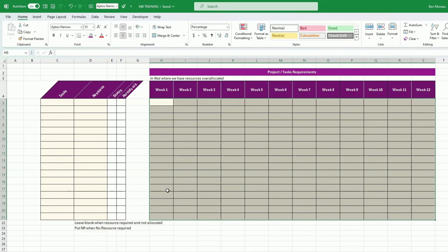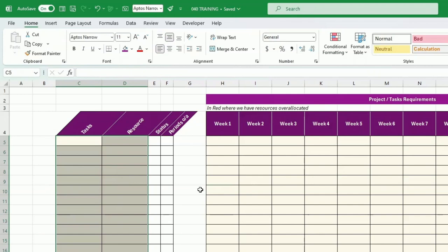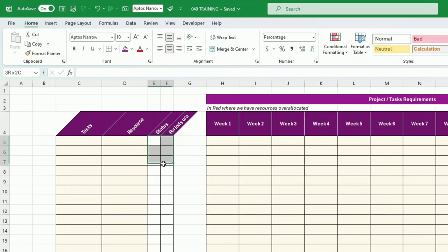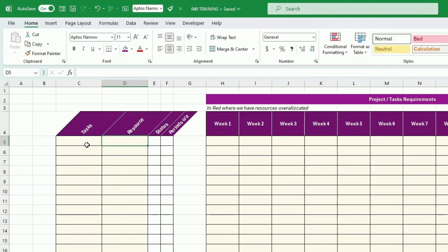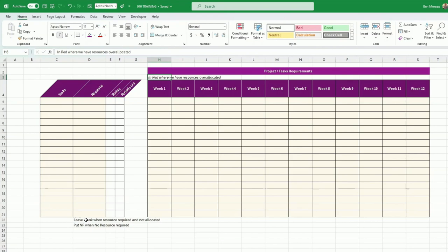You can have as many rows as you like. On the left-hand side I have four columns. The ones in pale yellow are where you input things, and the ones in white are calculated. The first column is for tasks, the second for allocating resources, the third for status, and the fourth for the number of periods of over-allocation. When the resource is required but not allocated, leave it blank. When no resource is required, put 'NR' — this way you won't have everything highlighted in red.